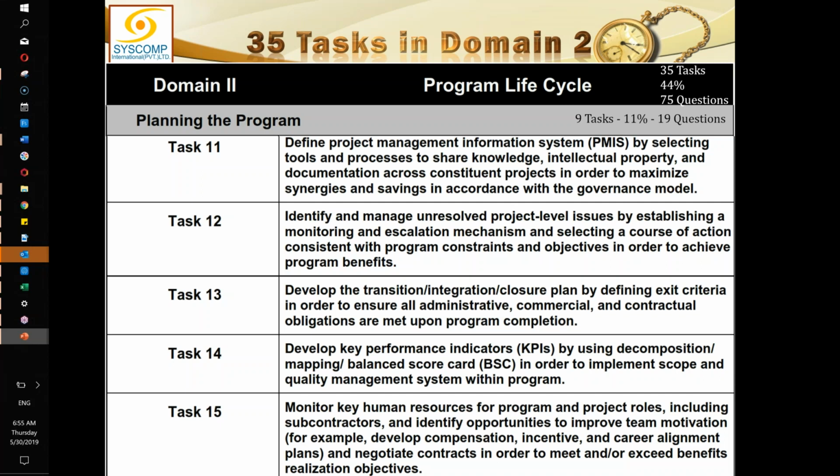You see, I'm not interfering with the business of the project, but a project is ultimately a subordinate entity within the program, and whatever a project manager can resolve, he will resolve by himself. But there will be issues which will have to be escalated upwards. The unresolvable issues which the project manager will not be able to resolve because that is beyond his power. You see, when a project manager is doing a standalone project, the escalation path goes directly to the project sponsor.